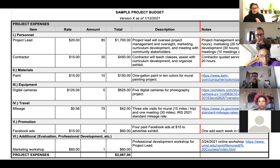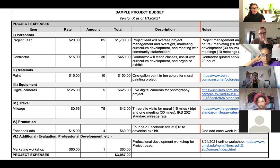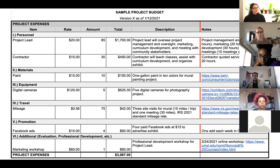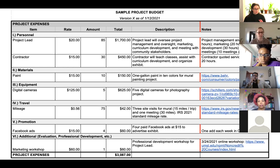The date is critical. If you haven't touched a budget in a while and you go back to it, you won't remember whether you included a small revision. Make sure that whenever you make a revision to your budget, you are updating the date. Moving from left to right column-wise, we have: item, rate, amount, total, description, and notes.